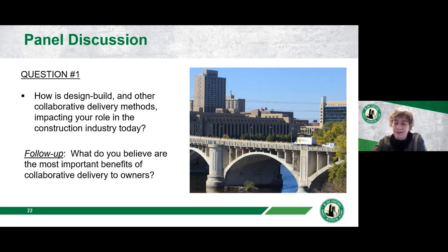And if they're doing a project where they are not looking out for the best interest of the client, the expectation is they would not be accepted back in the future. So for owners of choice, they'll typically have the actual price be 30% max, maybe 40, but certainly not a substantial portion of the selection criteria for a best value design build.